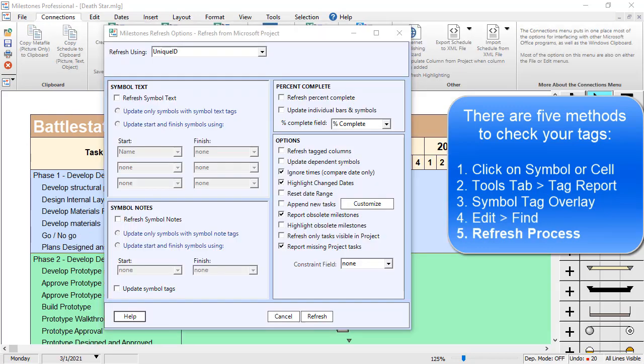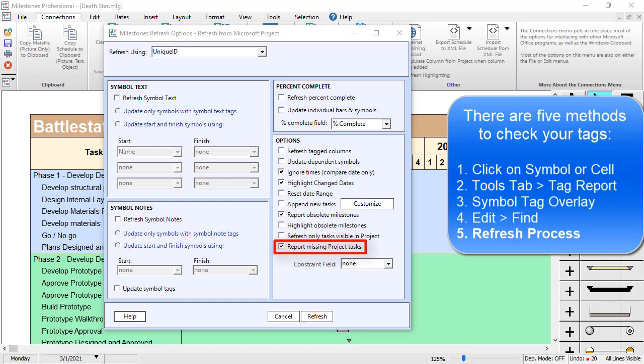The final way to check Unique IDs is during the Refresh process. You have two options on the Refresh screen, the first of which is Report Missing Project Tasks. This tells you if there are any tasks in Project that aren't in your Milestone schedule.